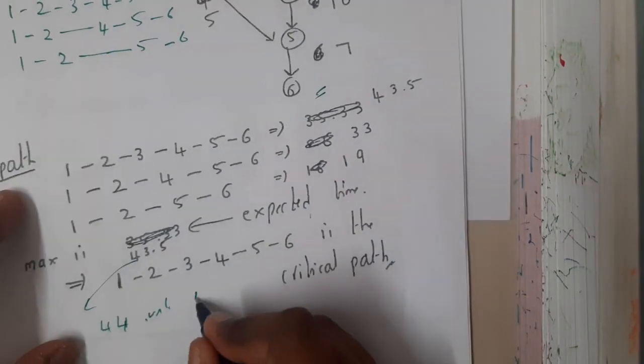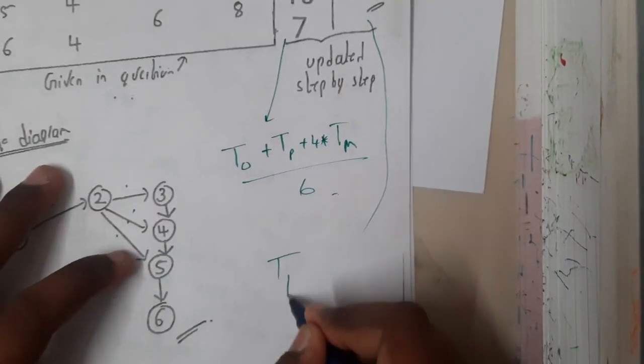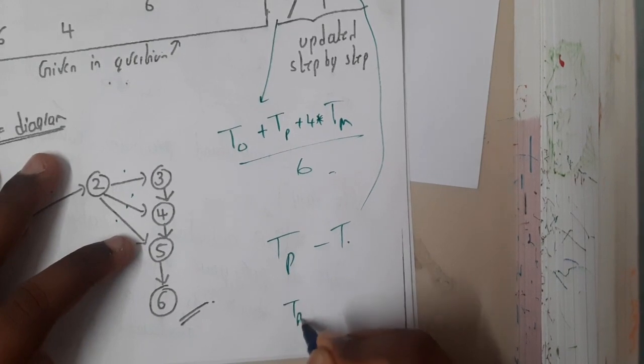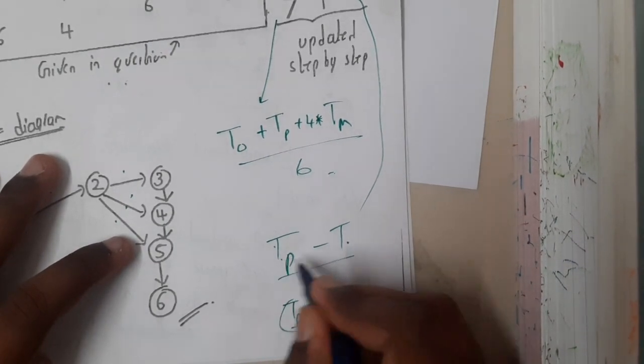Similarly, you can calculate the variance also. I hope everyone remembers the formula of variance: tp minus to. The trick is tpo, divided by 6, so tpo in that way. I hope everyone got some basic idea on this problem solving.